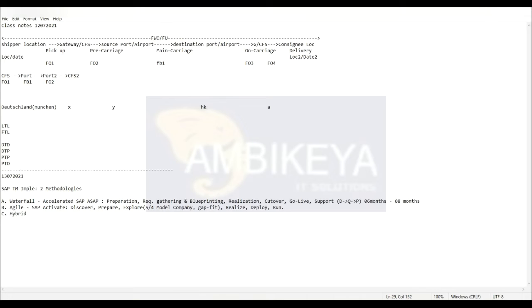That is not always advisable. You do some sort of pilot in, let's say, 4-5 countries or 4-5 company codes, and once that runs well, you go to the rollout approach for the rest. There is a global template, or GT, which is rolled out. The pilot implemented for 4-5 countries or 4-5 company codes at most takes 6 to 8 months max. It should not go beyond that. Does that answer your question?